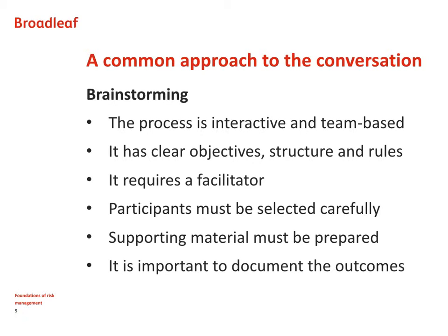A very common approach that is employed to risk discovery is to use brainstorming to hold the conversation. This is an iterative process. It's interactive, involving members of the team sparking off of one another, and it's team-based. Brainstorming has clear objectives, and these should be laid out at the beginning of the session, and generally the structure is provided by a key element system that we discussed in the previous module.